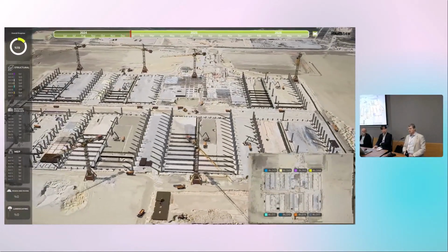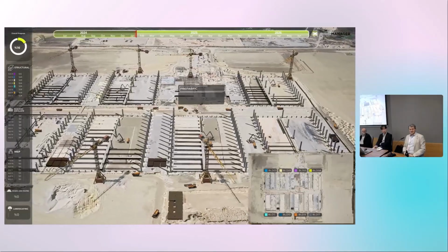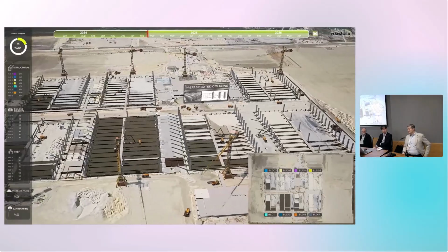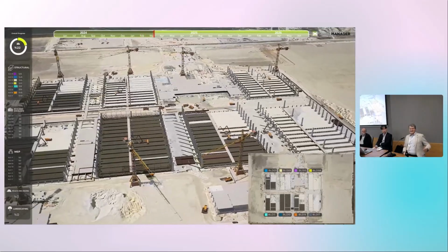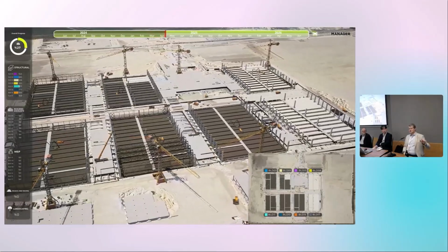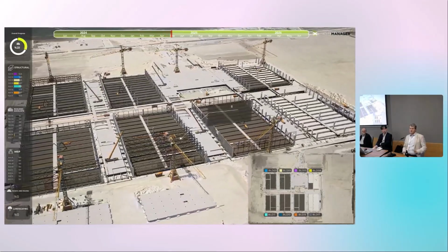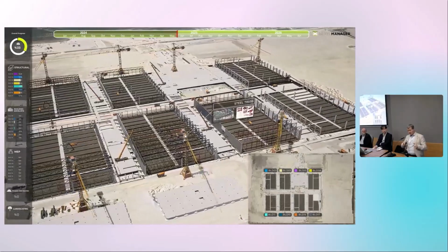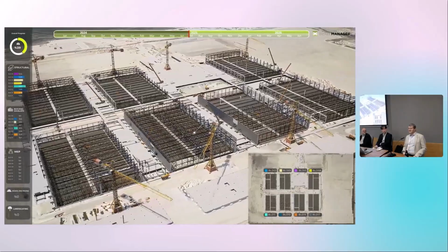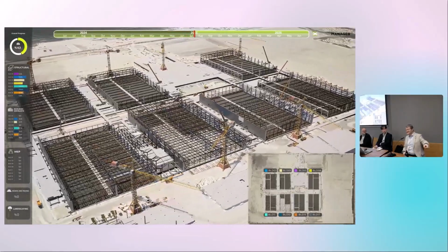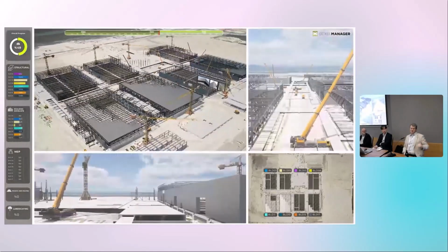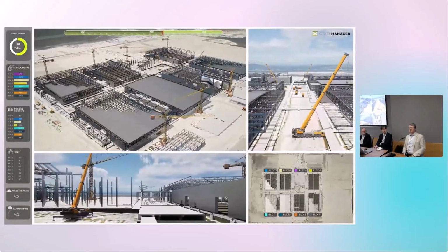As you know, I call this Hollywood BIM, but this is for next Expo projects or relatively large projects. This simulation from a pure BIM model took 5 minutes just to generate the initial schedule. To optimize resources, it took 4 hours. And to export to Unreal Engine and run it, it took more than a day. So it took almost 2 days.